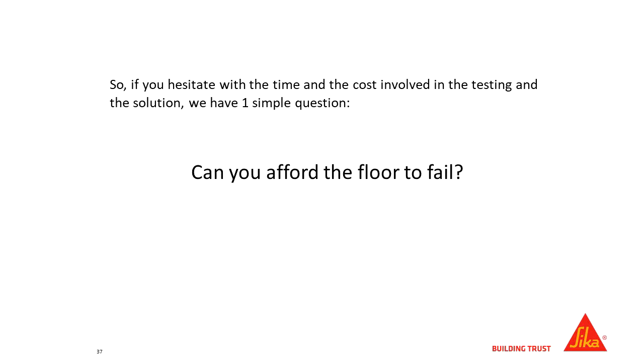If it's a hospital, you have all the beds, you have all the medical equipment. At a school, you have all the desks. I mean, everything that factors into replacing a floor far exceeds the cost of using a moisture mitigation system. So while, yes, it's a difficult change order for a lot of general contractors to stomach and a lot of architects to sign off on, when they see the cost of replacing the floor and they understand the mechanics of it and the reason it has to be done, we have a very good success rate of getting products like this onto job sites.